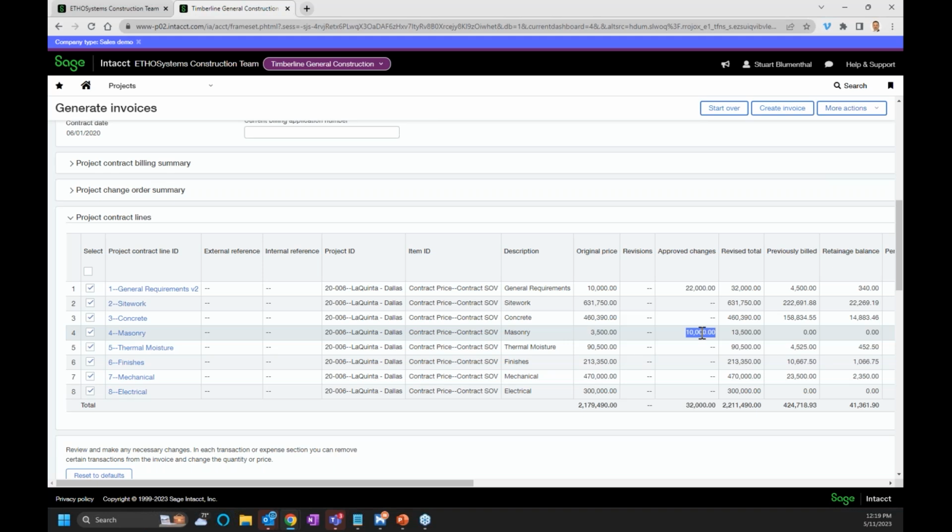So the question came in: if I choose an existing cost code to change to a change order, in your example, take that one, how will it affect the project estimate? Is it going to be a second line or added to the amounts of the existing? It will not create a second line. What it's going to do is add it to that line of that estimate. What if you're adding a project contract line?